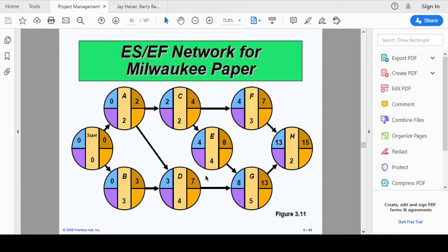ठीक है. तो similarly उसके बाद ये complete chart बन गया. तो D के बाद E आता है. Activity E is actually followed by activity C. Because activity E से पहले सिर्फ एक activity है, इसलिए activity E का जो ES है it will be exactly equal to the EF of activity C. अगर किसी भी activity से पहले एक ही activity आ रही हो तो उस activity का EF जो है वो अगली activity का ES बन जाता है.